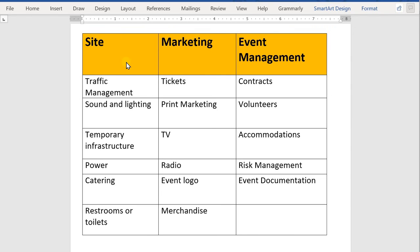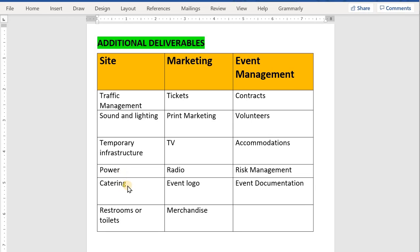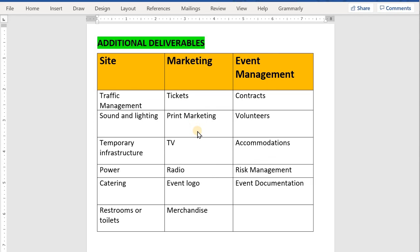These are also some additional deliverables which we can add in our WBS. I have just marked these work packages with the relevant deliverable. You can also add for the parking, traffic management, sound and lighting, temporary infrastructure, similar setup, power, catering companies. Also, we can include the restroom or toilet under the performance section. Then we can also, for the sponsorship, include the tickets, print marketing, TV, radio, sell the event logos. We can also add the accommodations for the music artists or any VIPs. You can include also risk management, event documentation.